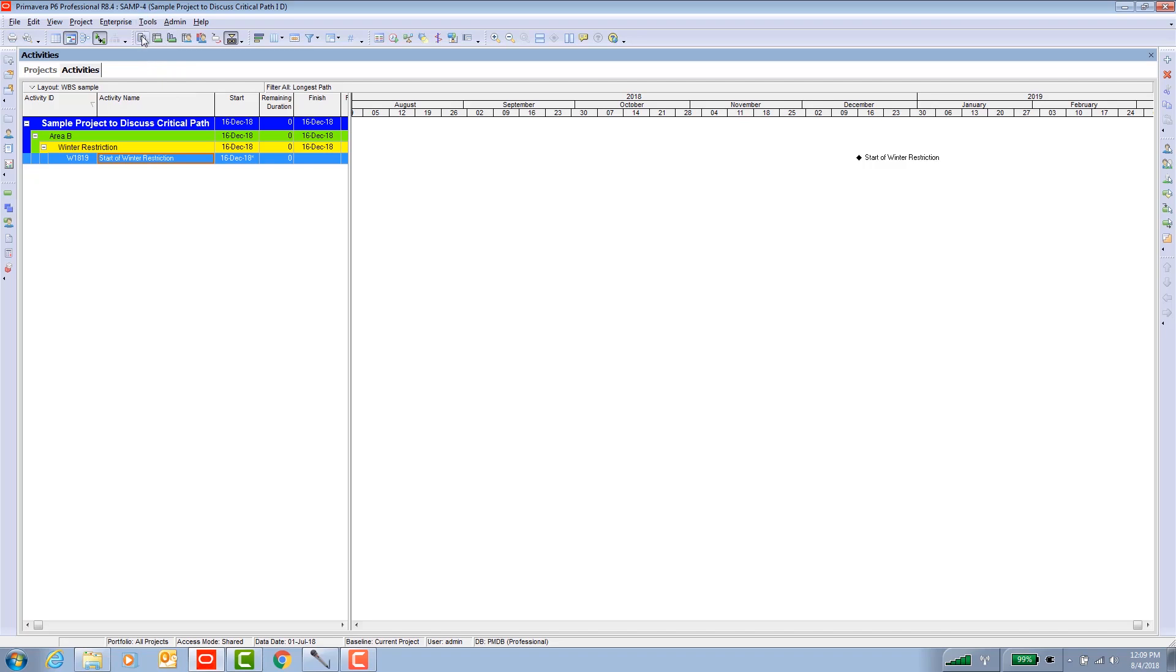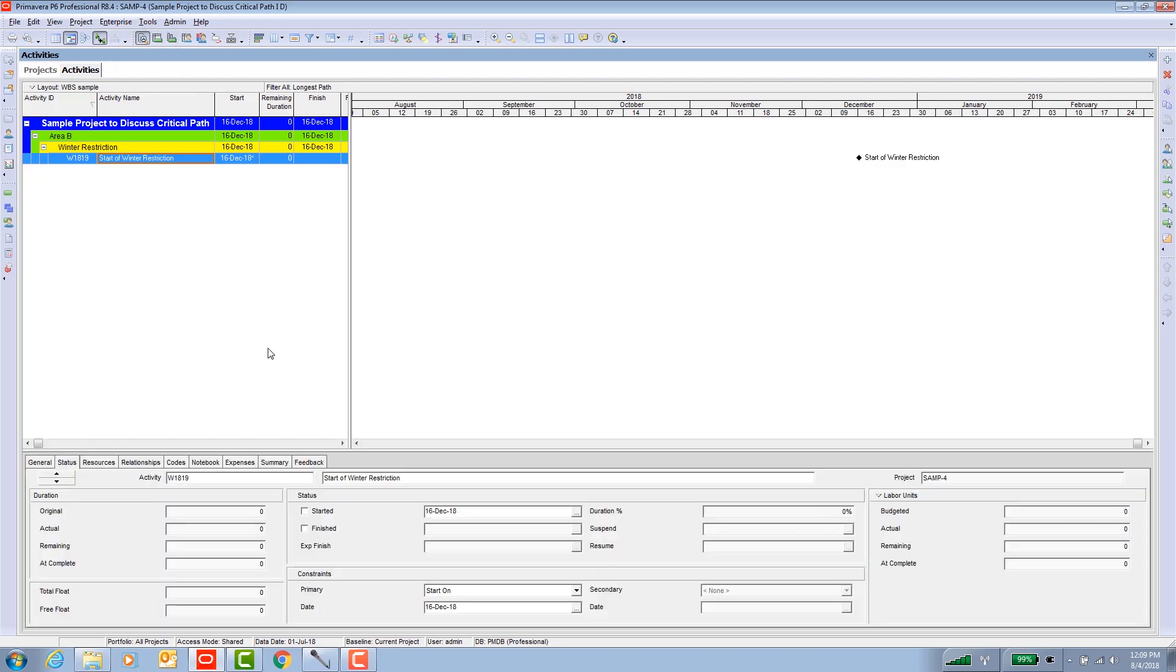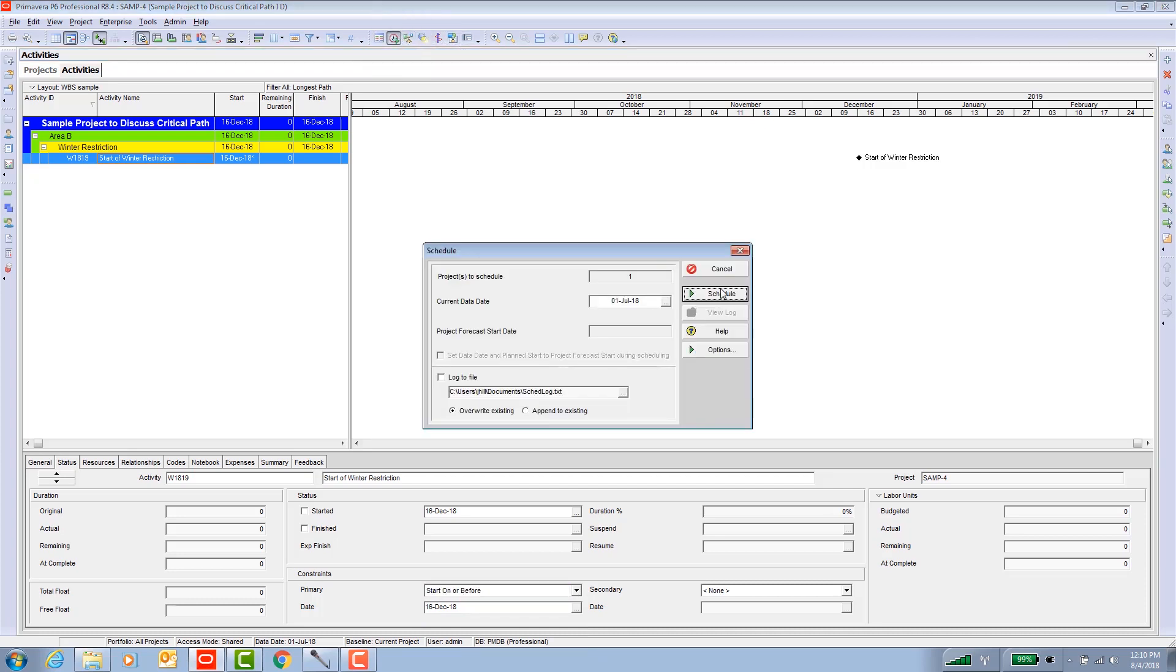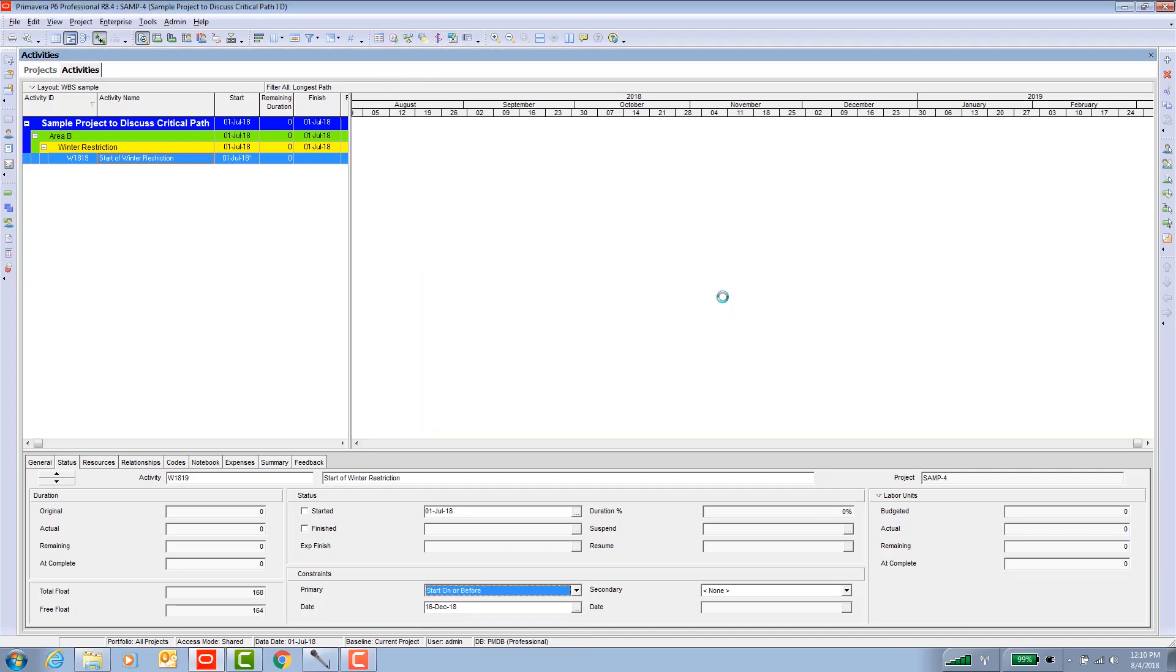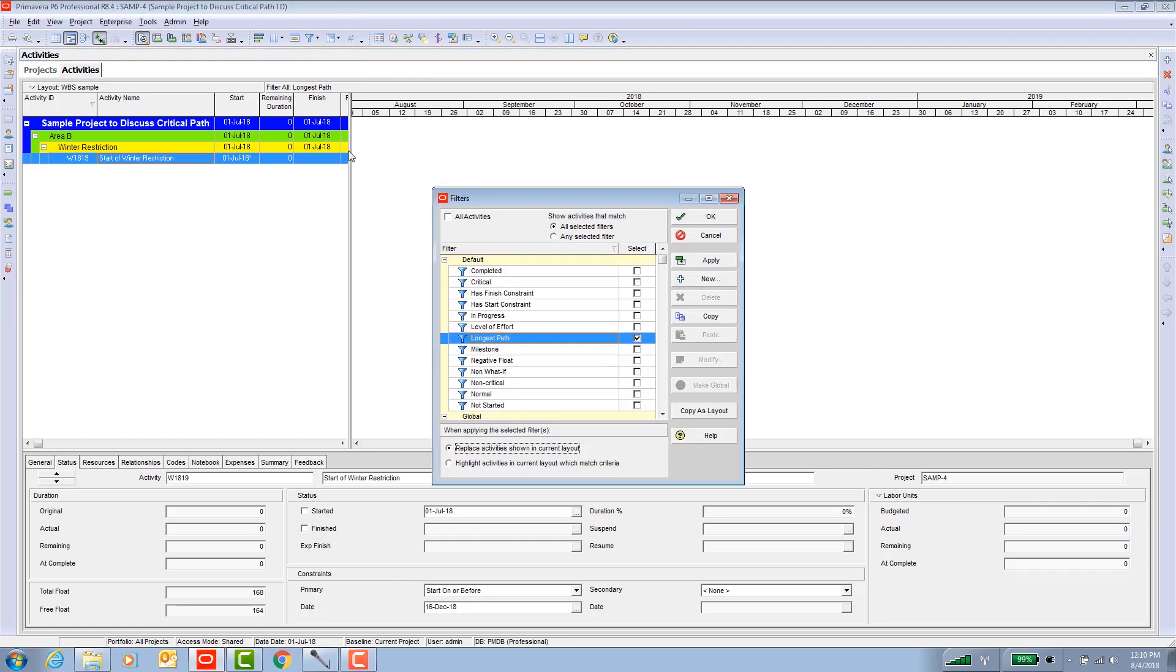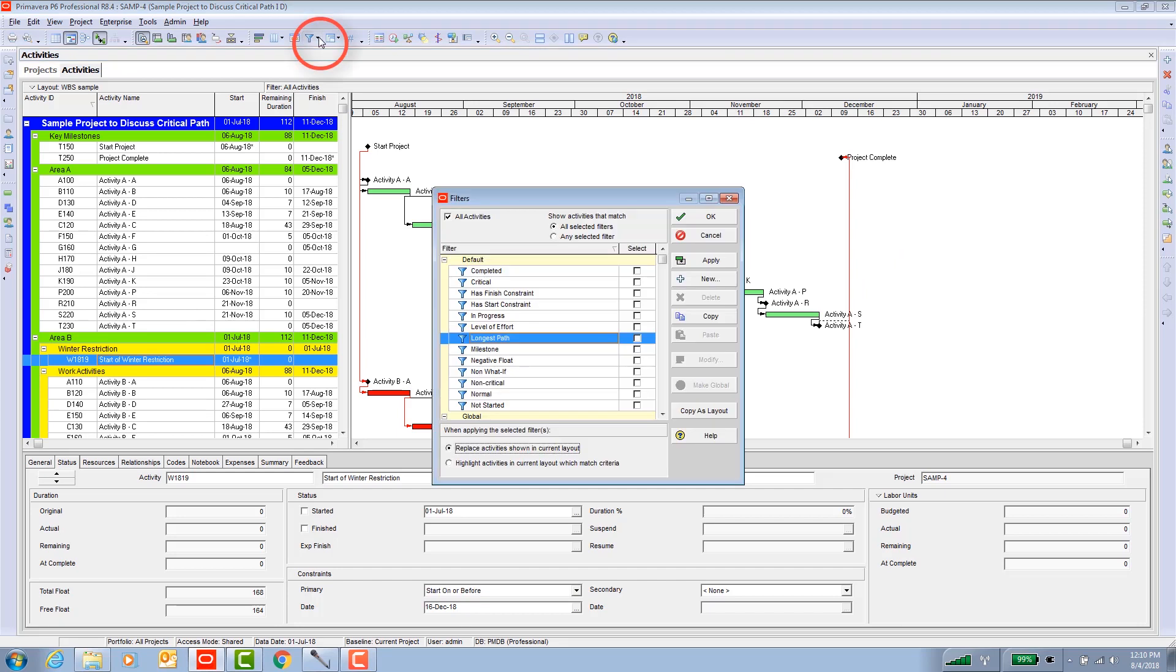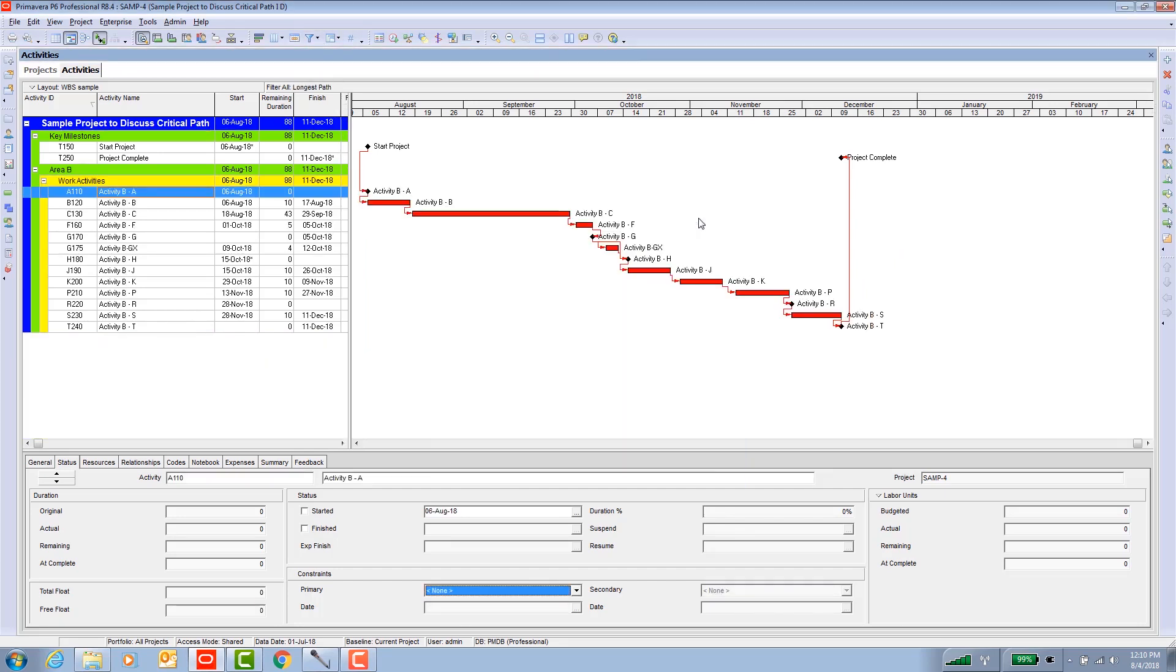Let me take that activity and make it go away. I'll change this constraint from a start on to a start on before, and I will schedule again. Then let's bring up everything again and let's try again. That activity is gone, so let's try it again. Let's bring up the longest path filter, turn it on. There we go. A nice continuous path of activities back to the start of the project.